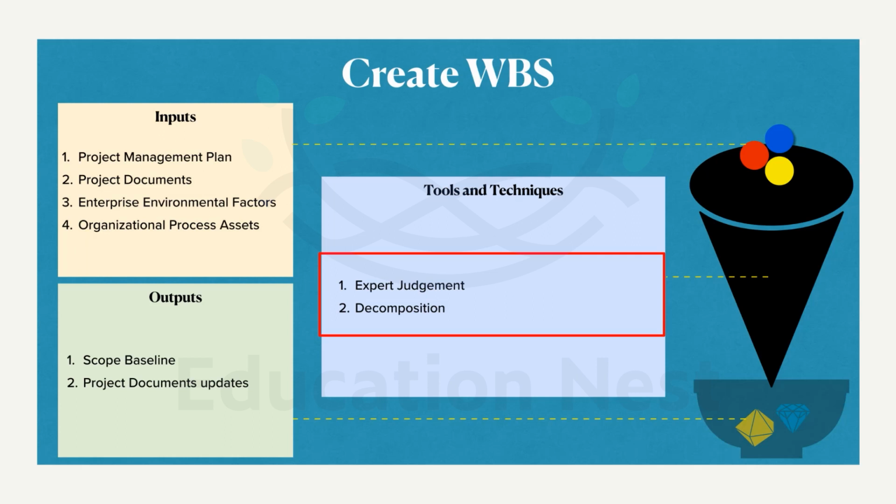It can be done phase wise. So that is one method, or it can be divided work wise, right? Major deliverables, for example, testing. We have a huge testing task. We divide it into 2 or 3 small testing works, right? So these are the decomposition techniques. You just remember that there are 2 of them: phase wise decomposition or major work wise, or major deliverable wise, decomposition.